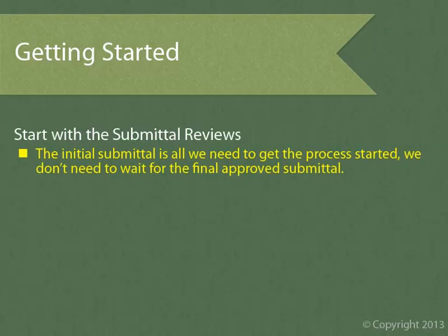As far as the exterior skin coordination effort is concerned, very little is expected to change during the design team's submittal review and approval process. It's not worth delaying the exterior skin coordination, awaiting what is expected to be just a few minor revisions to the final approved submittals. Also, in many cases, we only have a week or two between the time a submittal is approved and the time the respective fabrication needs to commence.